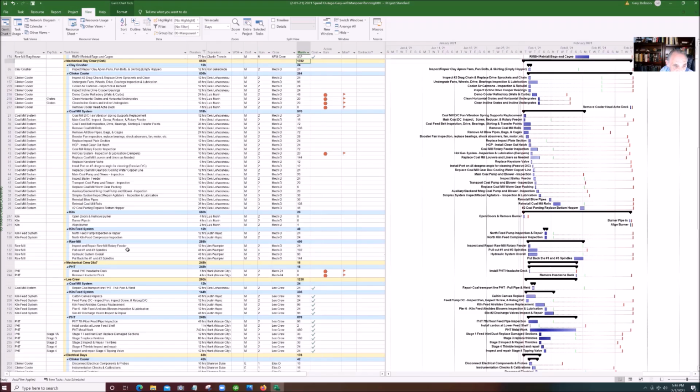So we could have a look at one job, for example, just the work in the kiln feed system, and say, all right, let's contract that out. But that's not going to help us because that'll just give us 48 hours, and we're short of more than 300 man hours of work.